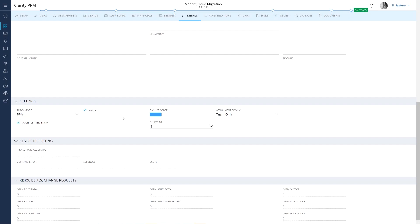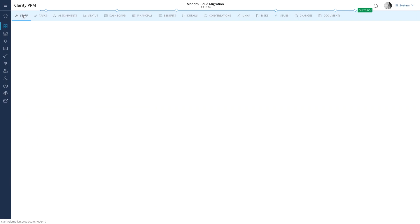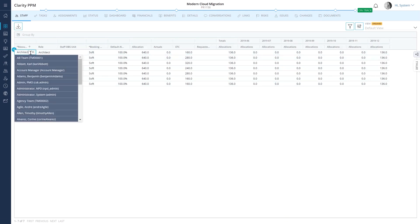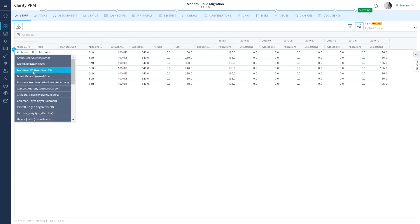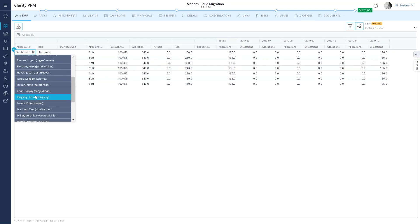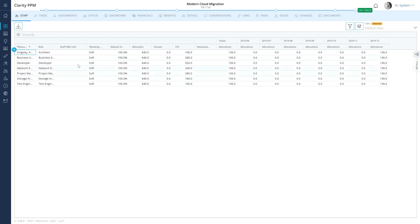Next, let's explore the staff module. Project managers and resource managers use the staff grid to allocate resources and roles to projects. Let's replace the architect role with a resource that is available to work on the project. Because art is committed to the project, let's update the booking status to hard.